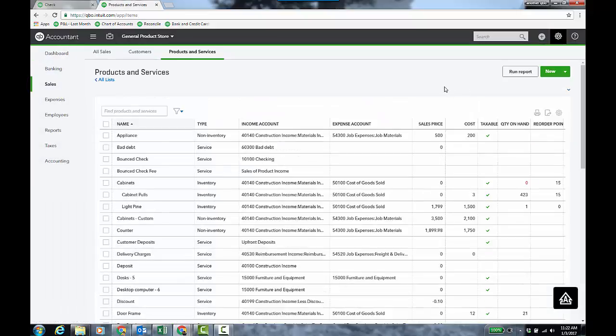This is why I like the third party better than the workaround. The workaround is just going to require a lot of rigidity for making sure you remember the cost of the job, et cetera, because there's no cost on the estimate, unlike desktop, right? We have that markup column. We don't have it. So you can't really use the estimate for everything. You got to use some reports or the products and service lists so you know what cost it was for the counter.